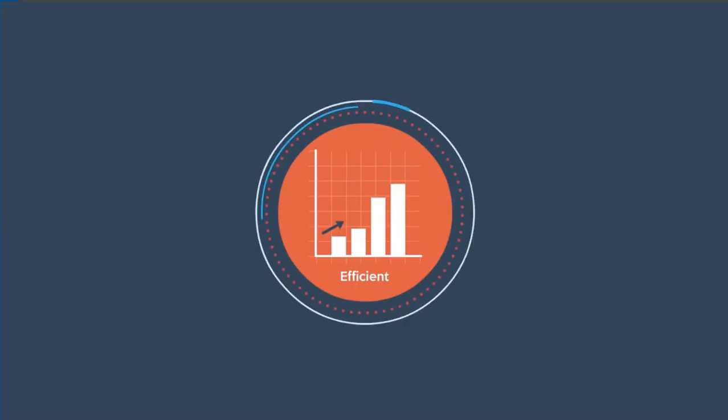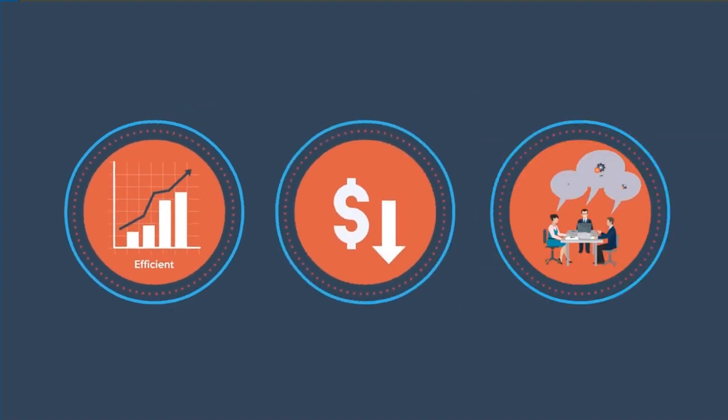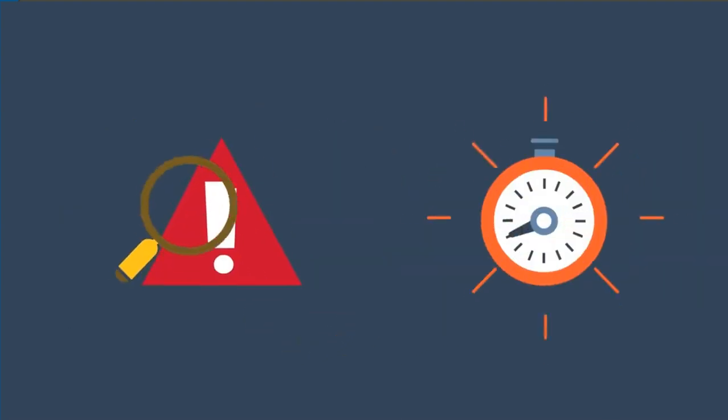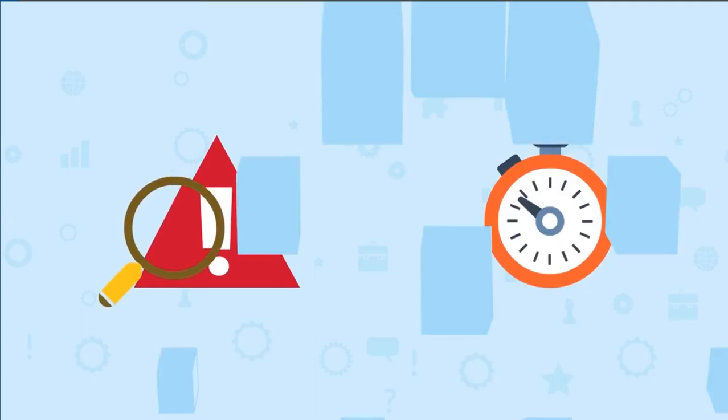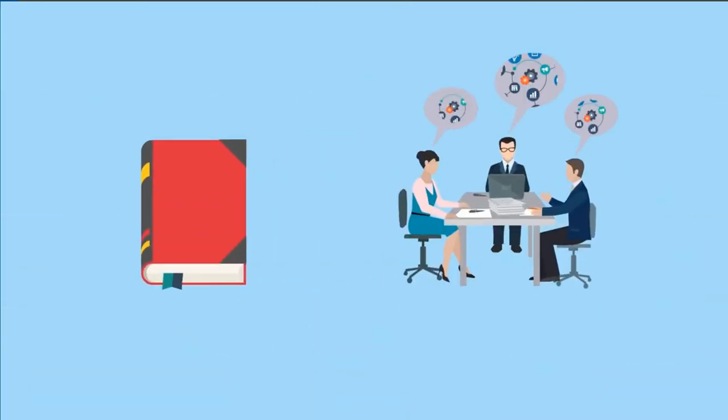It's also efficient and inexpensive. A single effective brainstorming session could conceivably identify most, if not all, project risks for a small to medium project in just a few hours. Let's talk about some guidelines for running one of these brainstorming sessions.